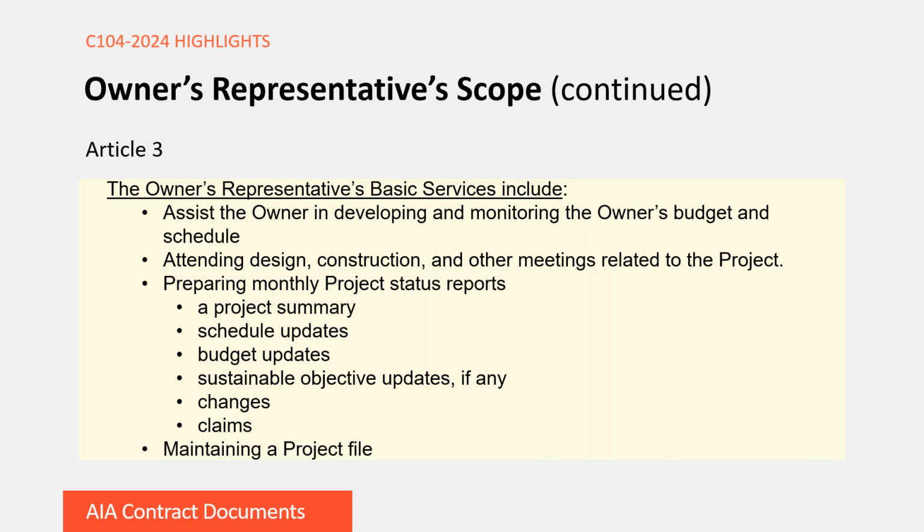the project. I should probably note that in this agreement, there's no limit to the owner's representative's virtual meeting attendance. The parties may negotiate, however, the number of in-person design, construction, and other meetings related to the project, and they would include that in the cost of their owner's representative basic services.